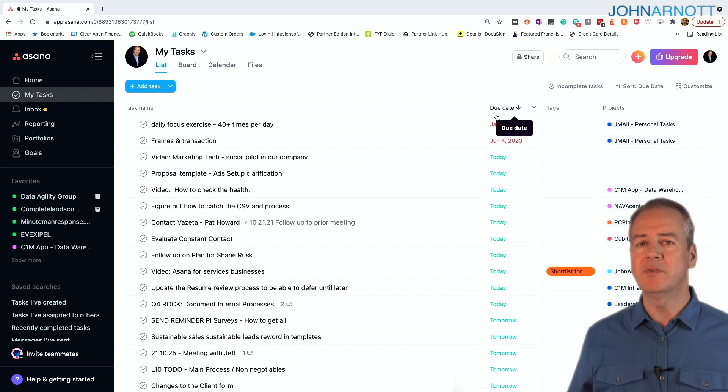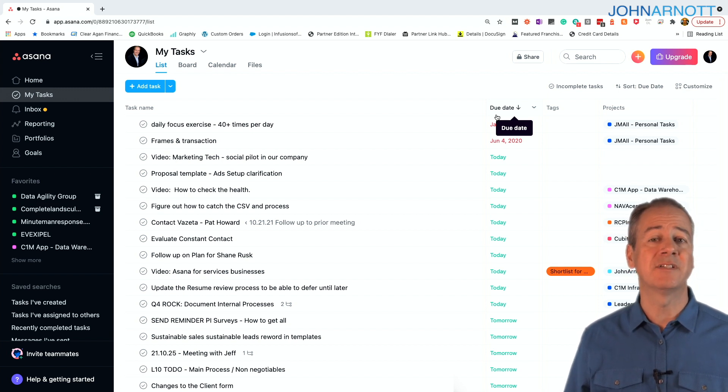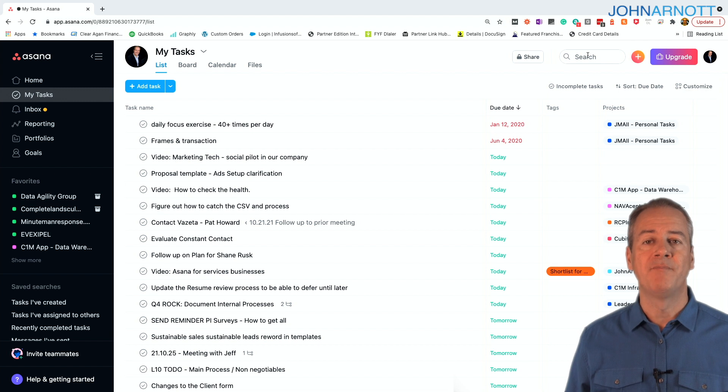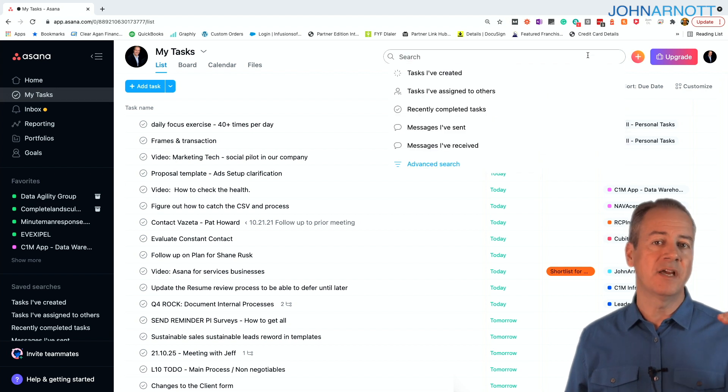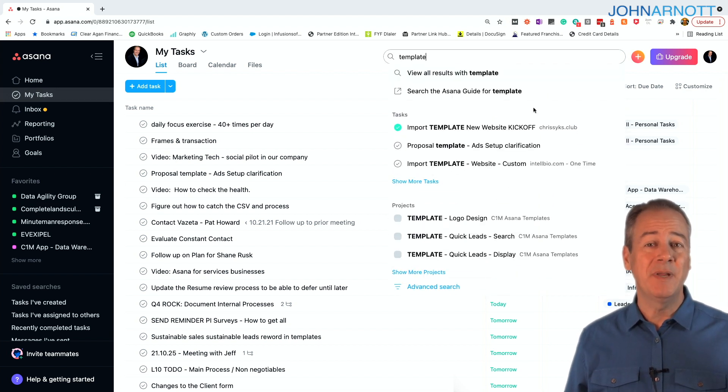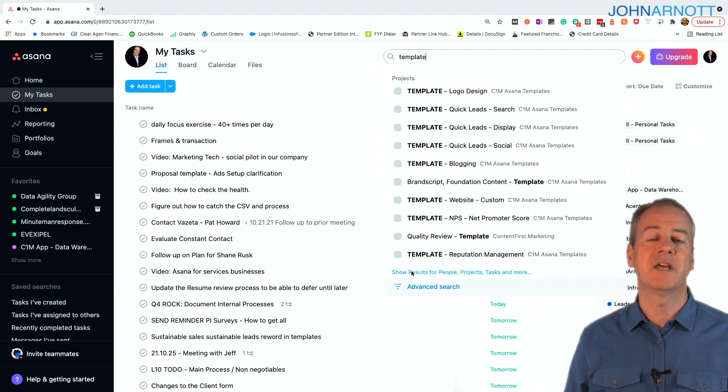What we do is we use templates for every type of project we have, so the project manager can simply import the template, and then assign due dates, and assign people to do those tasks within the context of the project.